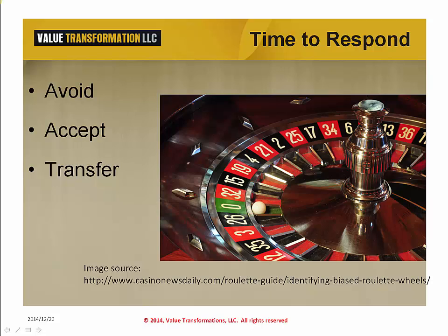Transfer is when we assign the risk to somebody else. Your home and auto insurance is a risk transfer approach. Some say that outsourcing is a risk transfer approach. That is only partially true, as the outsourced work or project failure can still impact the entire project and our organization. That is, we may still acutely feel the pains of the risks.